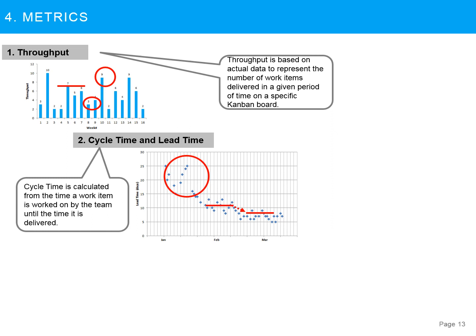Before I move to the next metric, one more observation I'd like to share. If your cycle time and lead time gap is getting closer, it's an indication of backlog starvation, hinting that as soon as the work item is dropped in the backlog, it's immediately actioned. So that means the team doesn't have a backlog. I'm not saying that it's necessarily something bad, but maybe one action we can take is to increase the backlog.